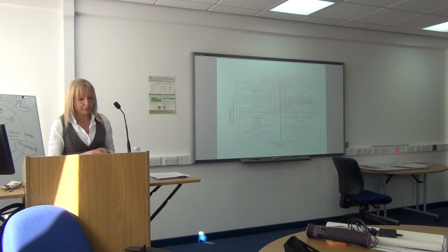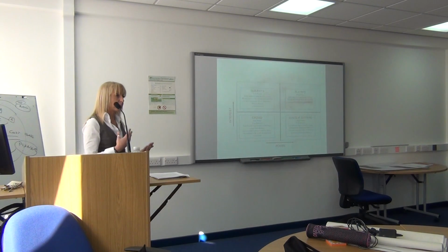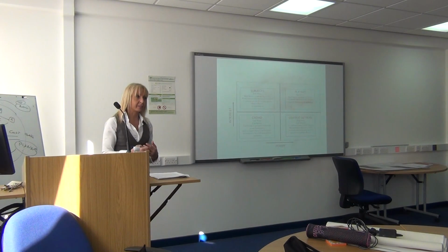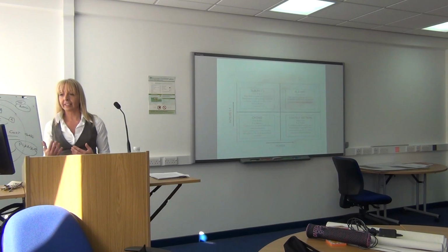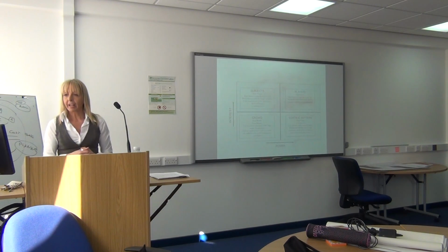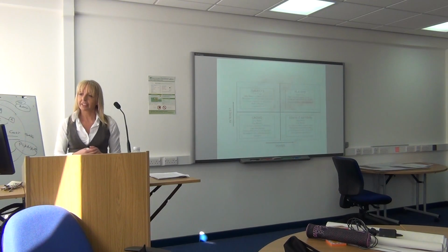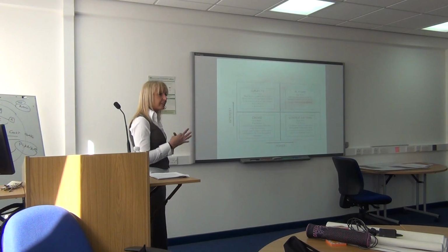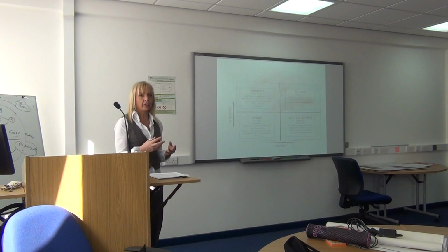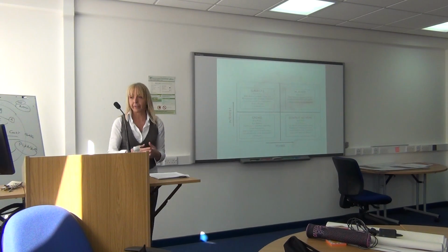We have subjects which have low power and high interest, and these could be both positive and negative. It's not just the interest as being in a positive sense, but also could be in a damaging sense. Management could encourage coalitions to increase power of positive and convert them to players or neutralise the negative. So by identifying who these people are, you could then use this as a tool to try and coerce or convert people's interests or power.